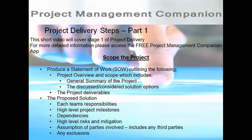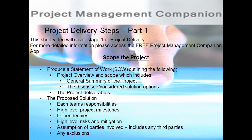Stage 1: Scope the project. This involves the following. Produce a statement of work, or SOW for short, outlining the following: project overview and scope — this is the general summary of the project, in part made up of discussions or considered solution options you have with your customer. Then you should outline the project's deliverables.